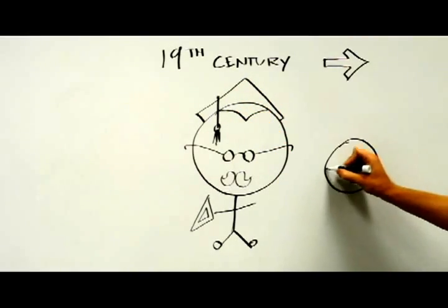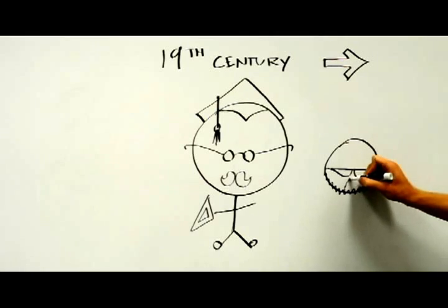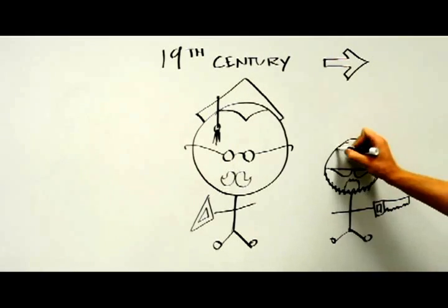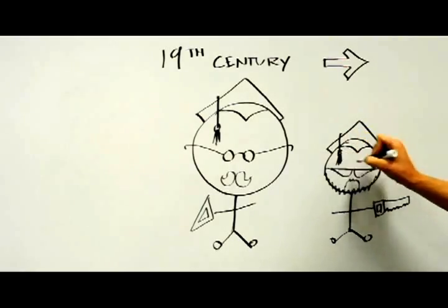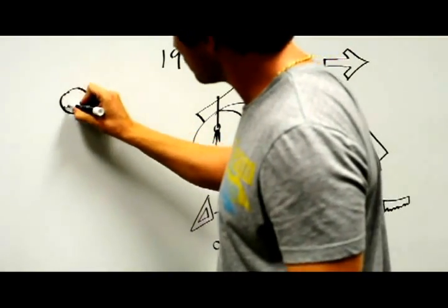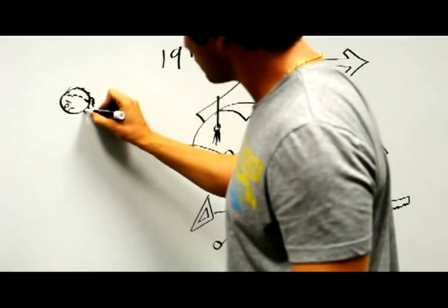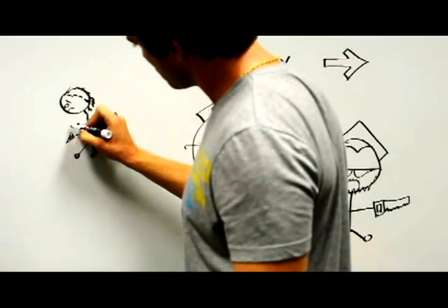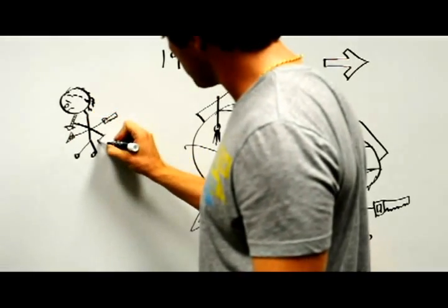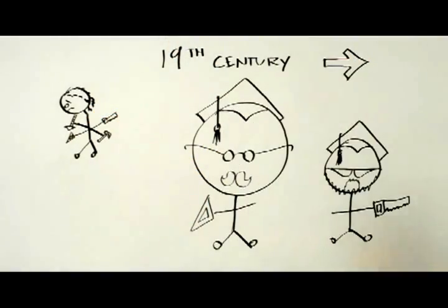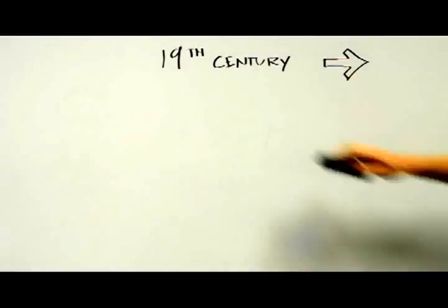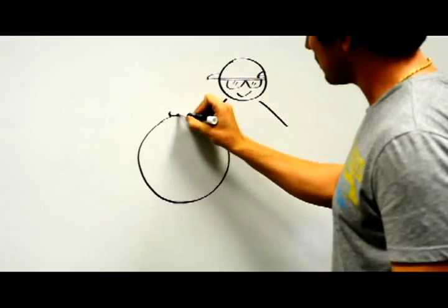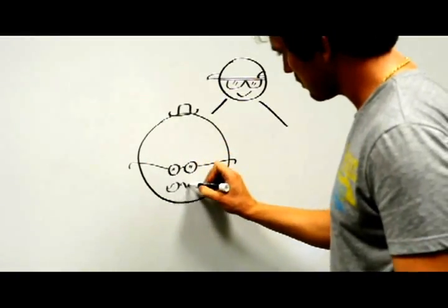Architects and engineers formed professional organizations like the American Institute of Architects, or AIA. Later, building science was also added to the university curriculums, and organizations like Associated General Contractors of America, or AGCA, were founded. This way, craftsmen were displaced from the industry and the relationship between today's architect and builder emerged. Architects provided the design, builders built what was designed, and the design bid build project delivery became common. It is a method in which the owner forms a separate contract with each of the parties involved, the design party and the construction party.